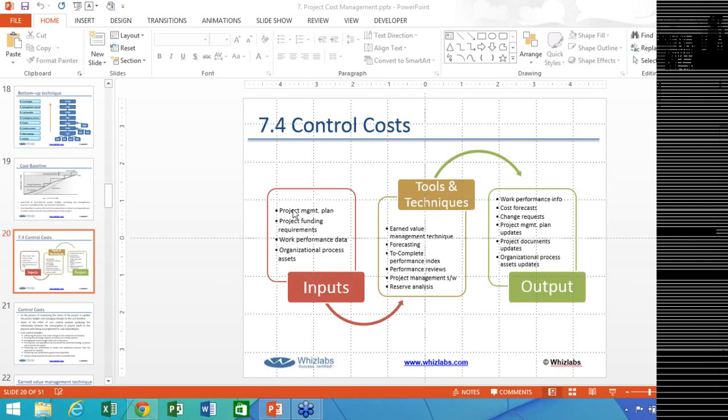Then in this case, does it come through a change request, like the change control board? Yes, it comes through a change request. It has to be evaluated by the project manager initially, then they can submit it to the change control board for the entire revision, and they give the final decision on that. Any change on schedule, any change on cost, any change on scope has to be initiated by a change request. This is a thumb rule.